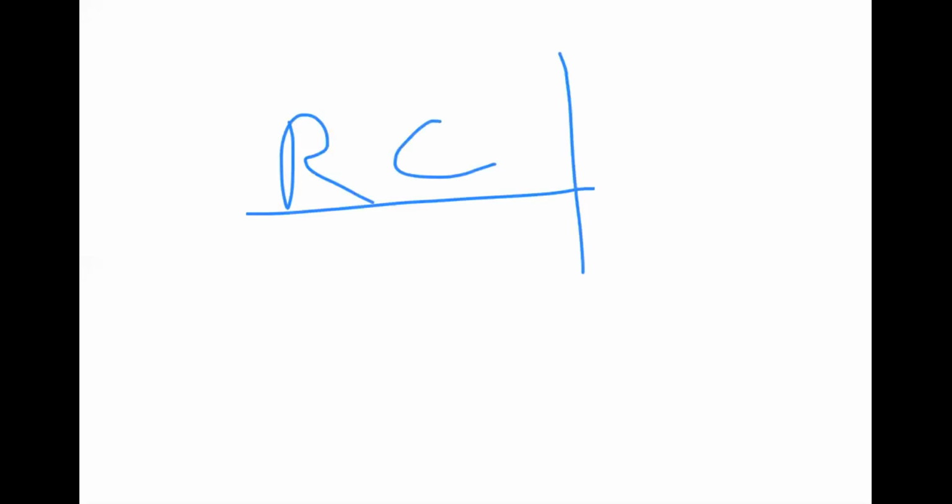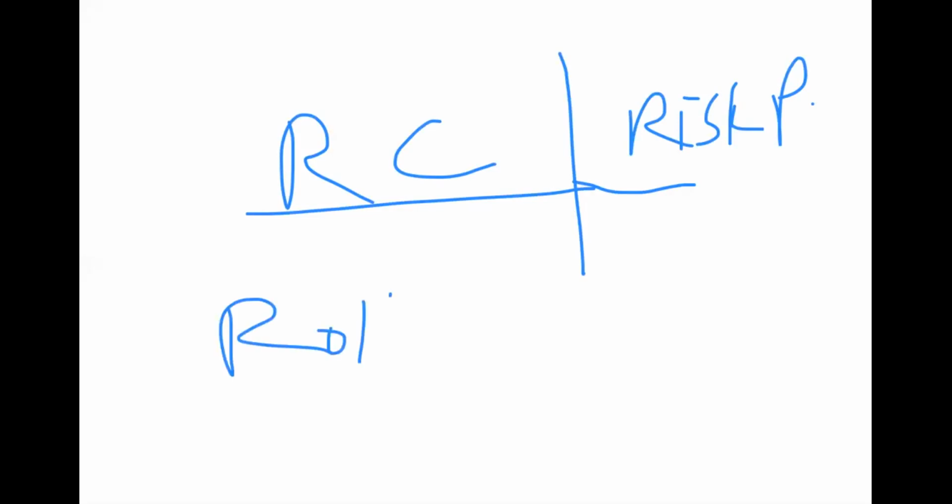So, my friends, we have risk categorization, categorizing risks in a particular risk process. Do you know that you categorize risks in perform qualitative risk analysis and not identify risk? Did you know that? I just dropped some gold for someone. I don't want you to struggle too much. Just a bit in finding the answers.